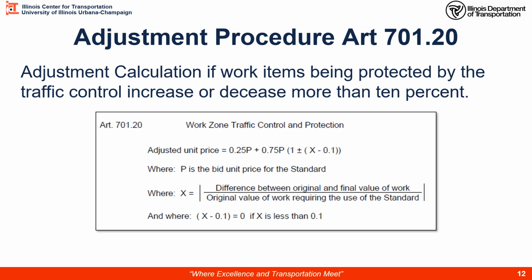We do need to make a little note though, to where this is going to increase or decrease our bid based upon this value. Once we stick it in this part of the equation, you'll recognize it's going to increase or decrease our value. So if we're adding work higher than the original bid, it should increase it. If it's reducing the amount of work, there was work removed from the original bid, we want to decrease it.